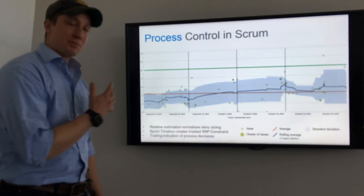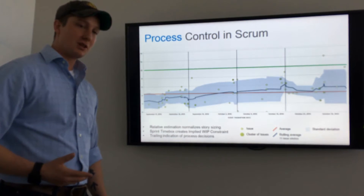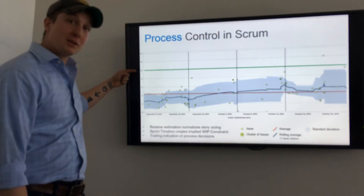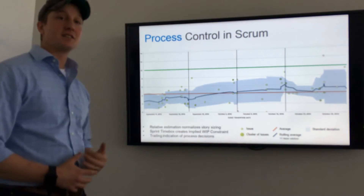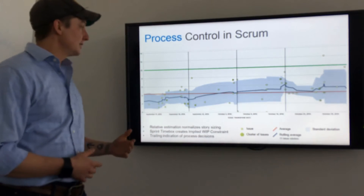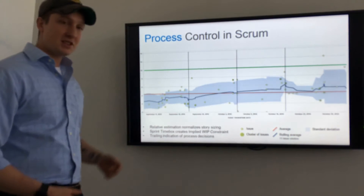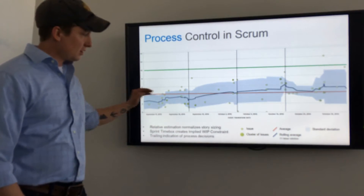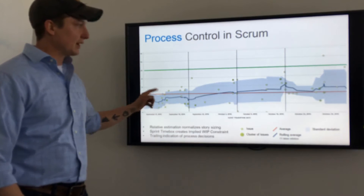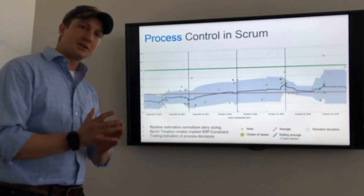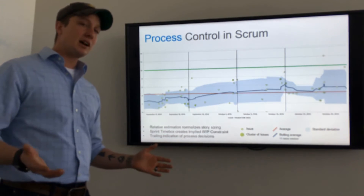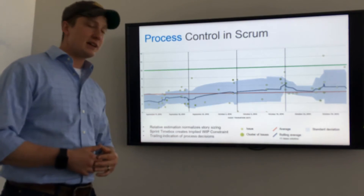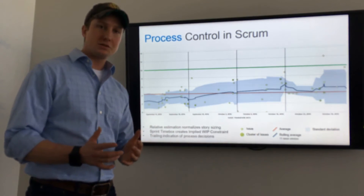When you look at your process control chart in Scrum, here's what you're looking for. You can draw an imaginary line at the number of business days in your sprint timebox, and your process should stay within those bounds. You can see this long run average and the rolling average are pretty close together, so there's not a lot of variability between the two. The standard deviation, likewise, is staying pretty close.